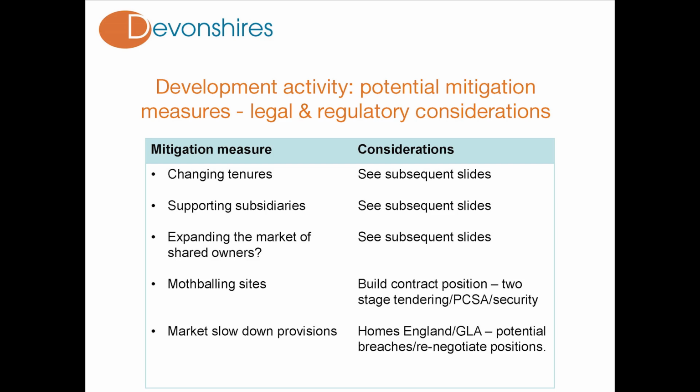And before you do, you've explored any potential mechanisms you may have within the contract. Homes England, for example, standard form build lease will require works to be done by certain dates, otherwise rights of forfeiture arise, but there is ability for extensions of time. One thing we would say is that COVID-19 is not always an extension of time under contracts. It's important to actually look at the circumstances that relate to the situation itself and to focus on those as part of the matter.